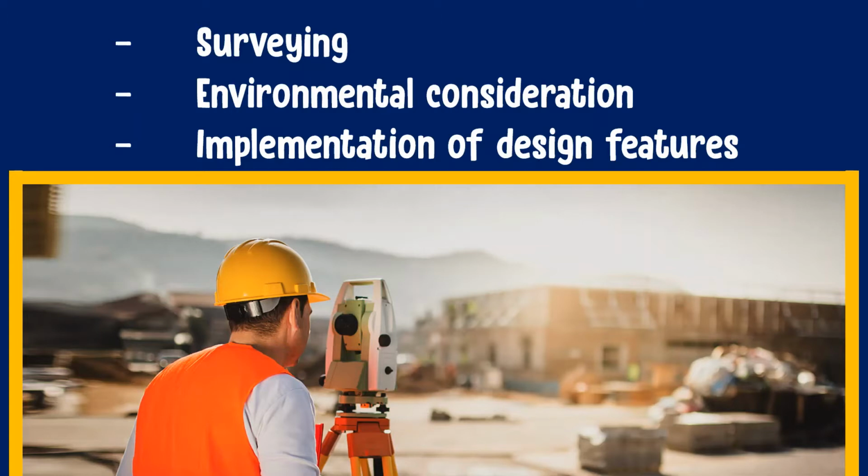First is estimate of cost of right of way or easement. Include supporting data. Second is estimates of cost for relocating public utilities within the construction area. Third is estimate of cost for removal of buildings and other structures within the construction area. Lastly is to provide any pertinent cost estimates or information that has been prepared.